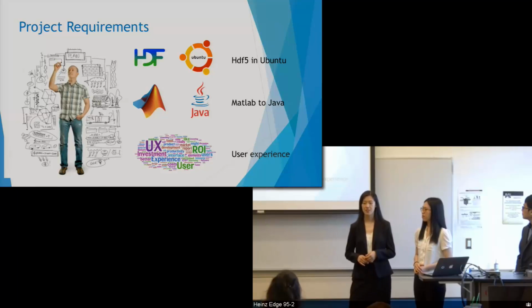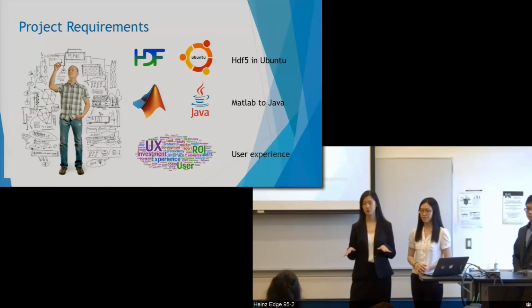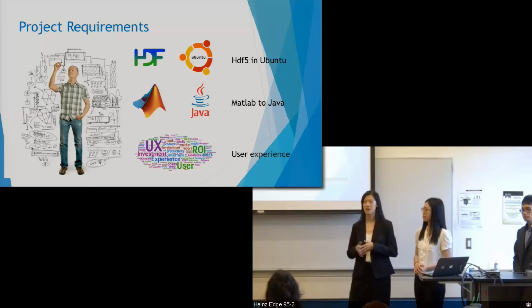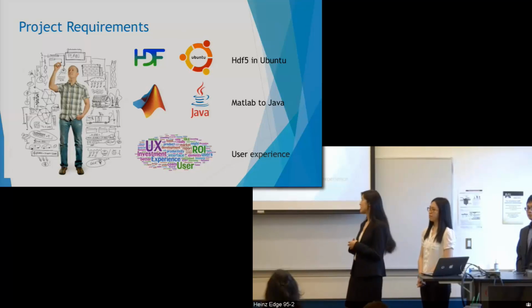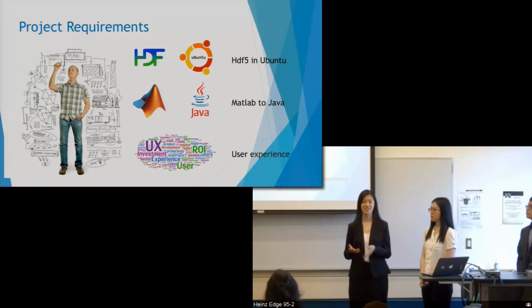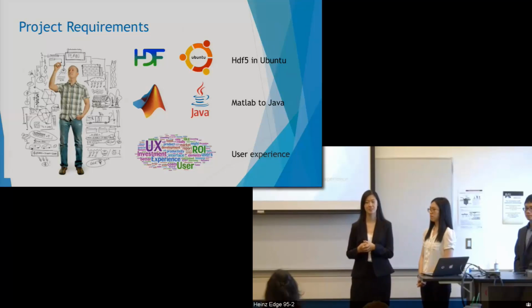Since we have finished the basic implementation and we need to work on the customized analysis, based on our current design, one more month would be the minimum time. More team members to help? Not really, because more people will take more time to understand the requirements. But since we can divide our system into 3 parts, if we had another expert who deals with HDF5 files or front-end design and implementation, this would save us some time.